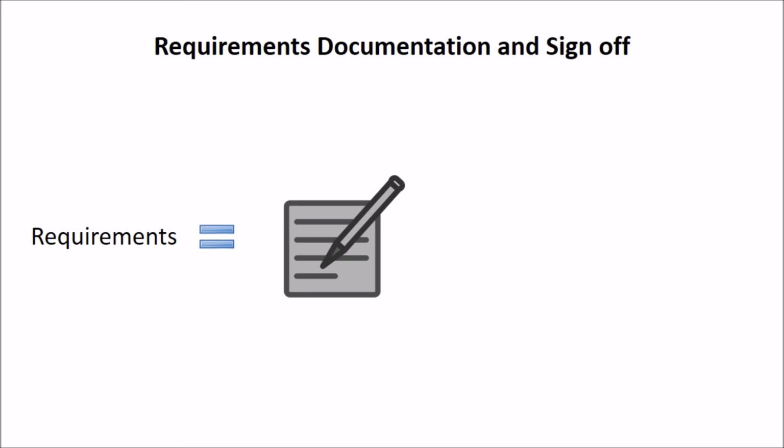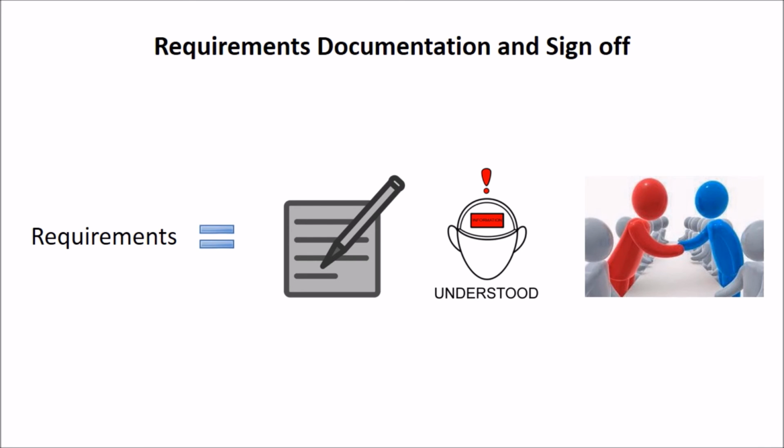Requirements documentation and sign-off. A business analyst will make sure that all of the requirements are written down, understood, and agreed with all of the stakeholders. This will baseline the requirements so any changes later on can be managed effectively and reduce the risks of scope creep. By having the requirements written down, development and testing can also be traced back to the requirements to ensure they are being met and ensure more transparency for agreeing when the project is being completed.